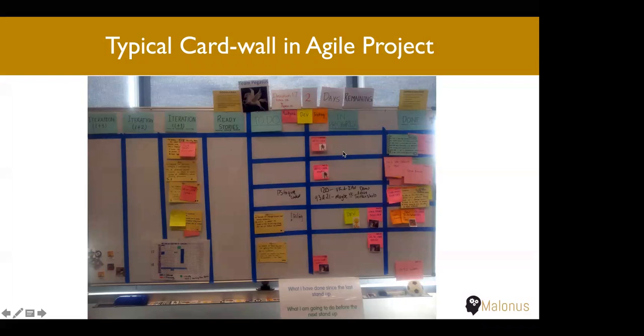And if something is in progress, it is not done. So the whole team has to make sure they are working together, collaborating, and making sure that this story is really moved to done. It doesn't really matter whose effort it is supposed to be. But as soon as you start dividing this in progress column into in development and in testing, you will find developers saying, my part is done, this is the tester's part. So you start having silos within your team, just because of having these number of columns.